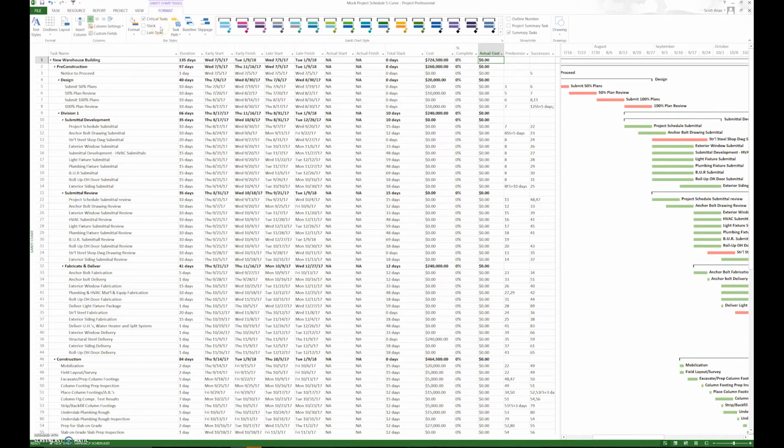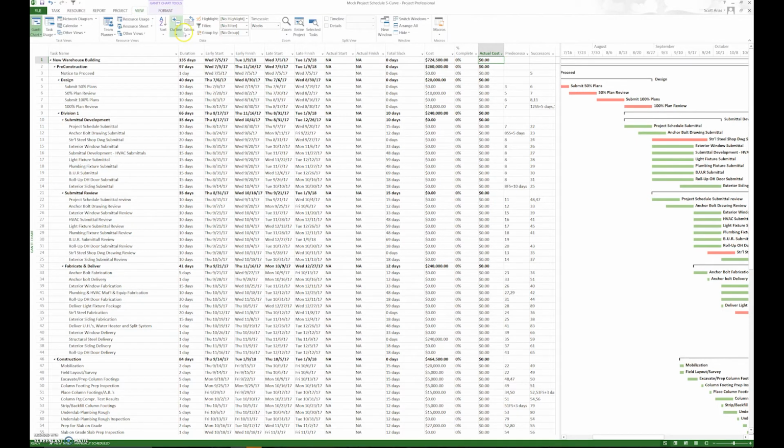And then the last thing that I would do is go to view, sort by start date, and that creates the cascading effect from left to right. You're able to review and present the schedule. It's important that every one of these summary tasks is open, so when we go to our last step, which is running the reports, everything is open and visible.